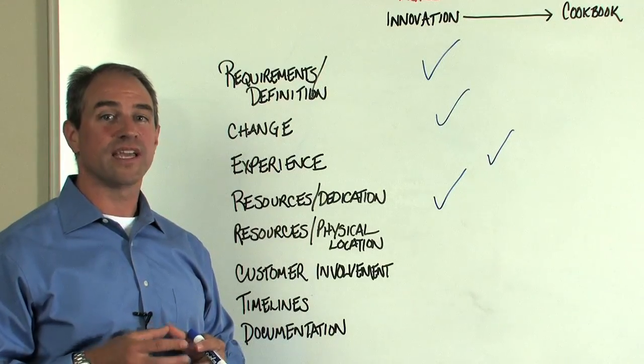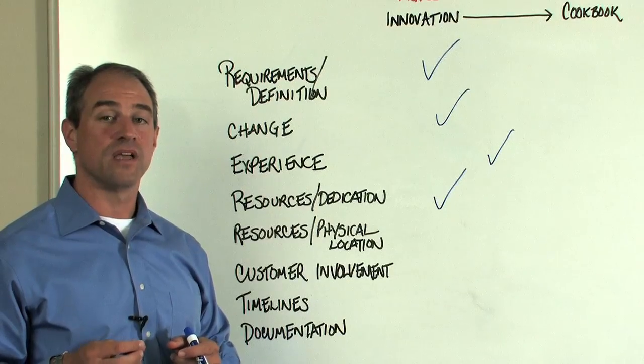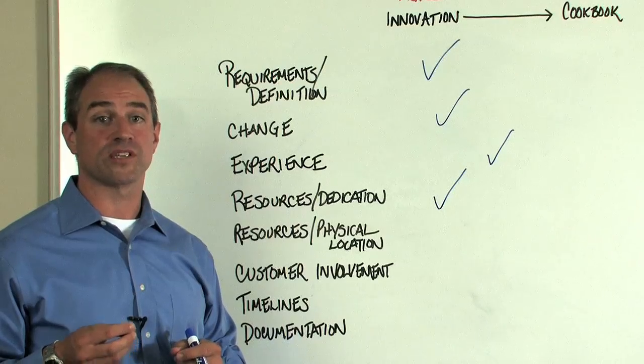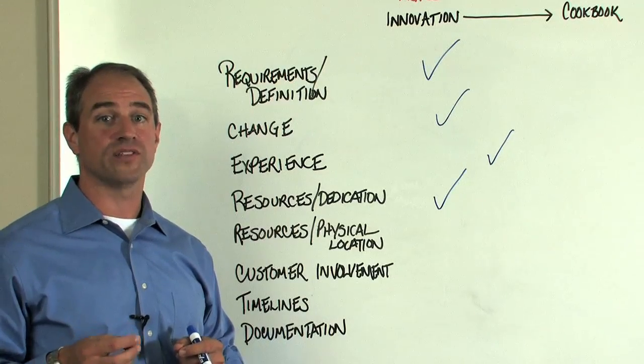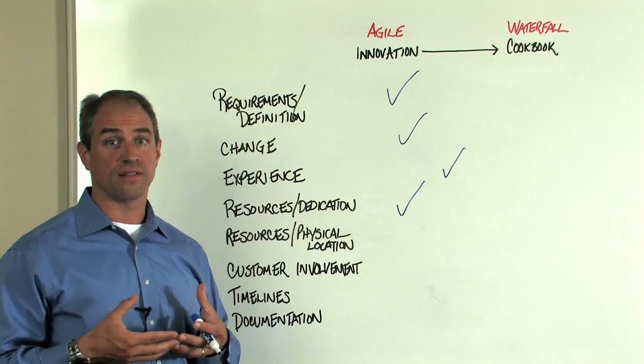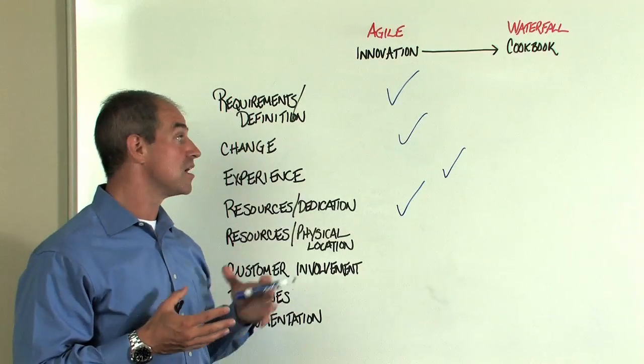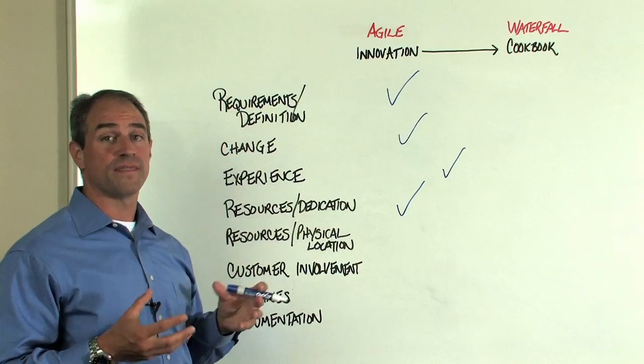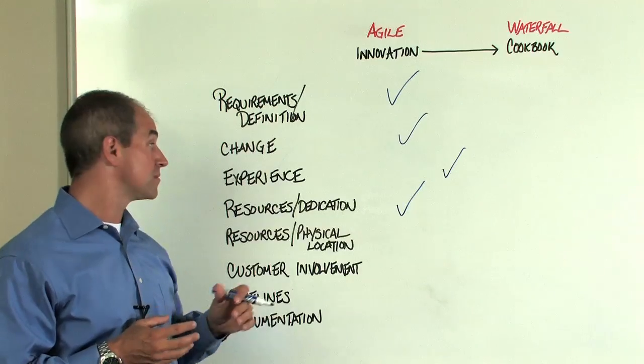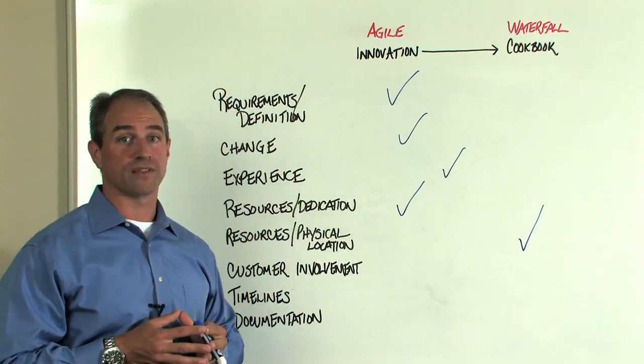The physical location. Can these resources be co-located in the same location? I know a lot of us have worked in environments where we've got distributed networks and we may have resources that are even offshore. How are we going to deal with that type of an environment? How are we going to bring those resources together? That's a challenge that we have to deal with and is a significant consideration. Let's say for this example that we have resources that are distributed and that we do have some offshore resources that we need to include. So we may be closer towards a cookbook approach on that one.